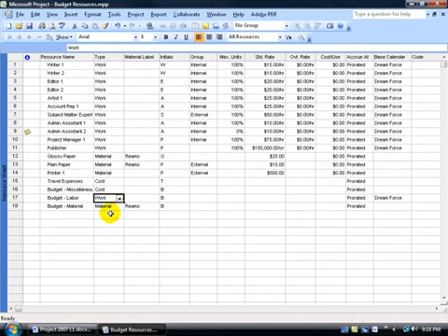For your work, you're going to be budgeting for how many man hours it's going to take to complete the project. You could say 500 man hours. As you actually start entering in the man hours, you may have estimated 10 man hours for one task, let's say, but then the writer needs more hours. Well, if you budgeted for 500 here, and all of a sudden collectively, because everybody's taking more time, it goes over 500 hours, again, no red flag, but that's just for you to compare your 500 versus what actually is being worked on.